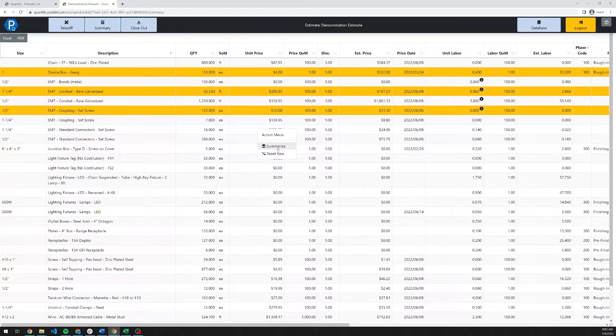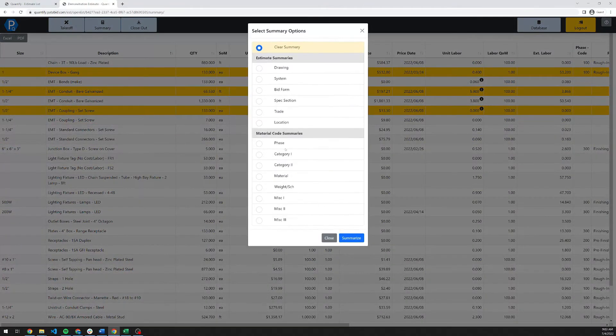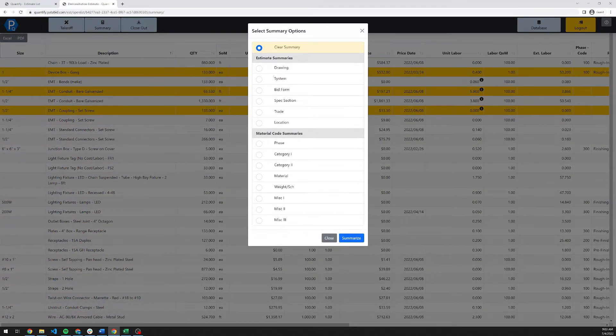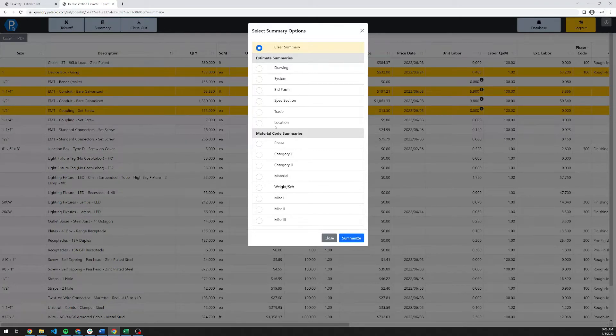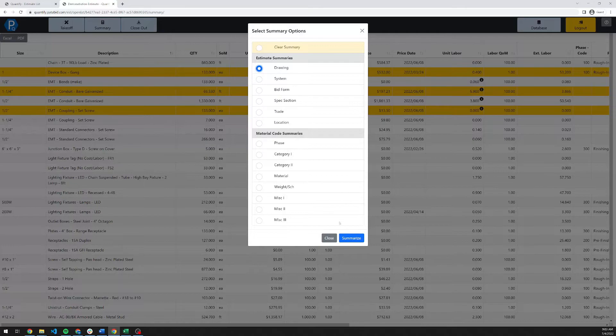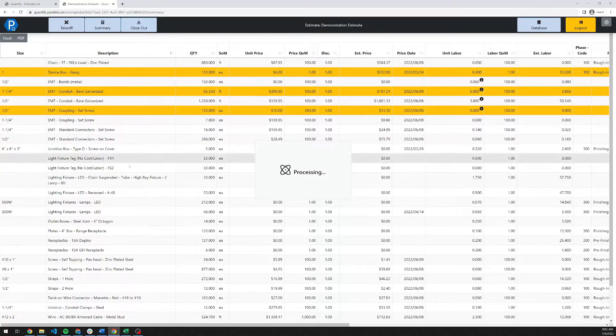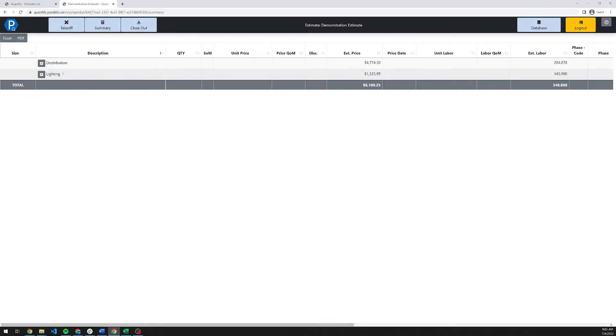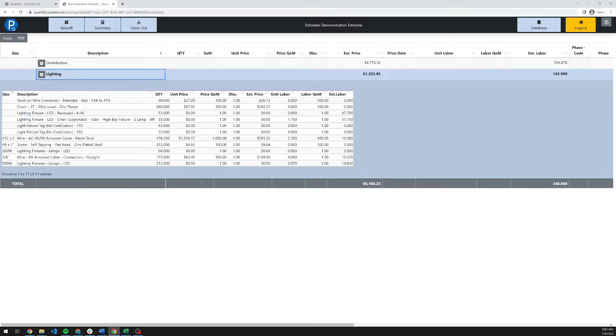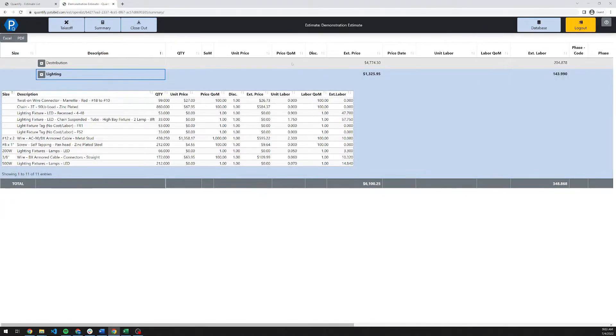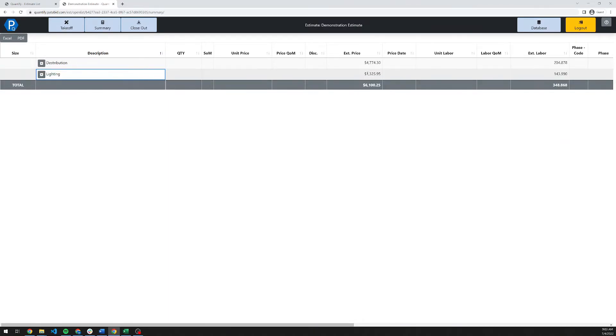You can also summarize this screen. If I right-click and select the summarize option here, you're given a list of options to summarize by. I'm going to select drawing for this one because we did work on two drawings there and hit summarize. The system will then go and break out your bill of materials according to that breakdown. You'll see I've got my distribution and lighting here. I can select the lighting, for example. This will be my entire bill of materials for that drawing. You'll also find your extended pricing here. This is the consolidated material pricing for this drawing and the labor breakout for it also.